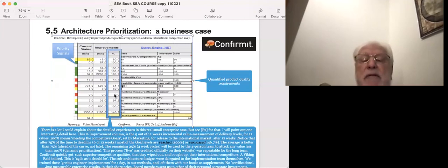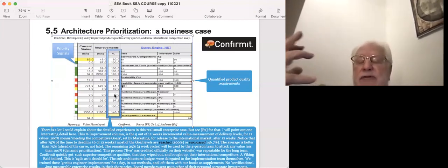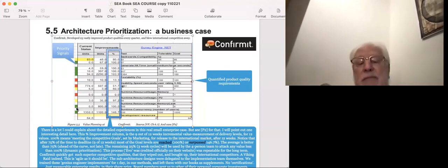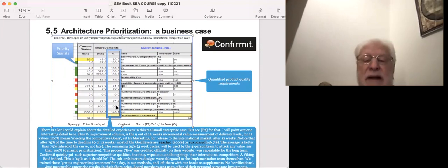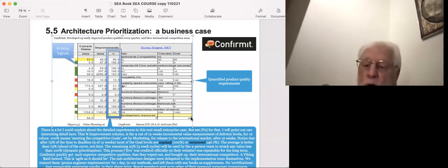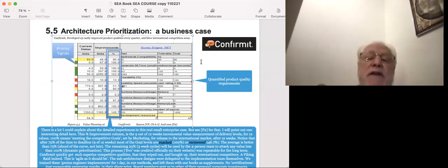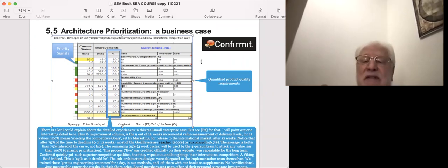For example, 0: they've got 3 more weeks before they have to deliver all of these. It's time to prioritize working on this. And that's why the spreadsheet was programmed to give a little red signal saying, alarm, worry about this. And green means, don't worry, what me worry, no problem, they're already there. Don't spend any resource on it. So this is automatic computation and feedback of the priorities based on the feedback compared to the goals. Okay, this spreadsheet was whipped up by Trond Johansen one evening at home. Okay, so it's that simple.